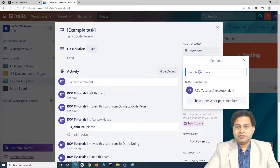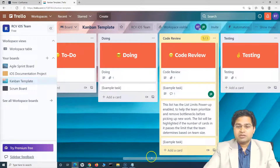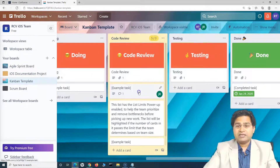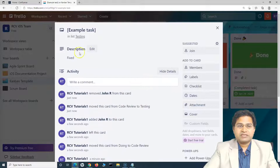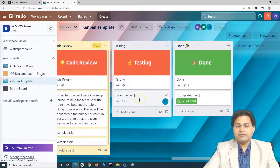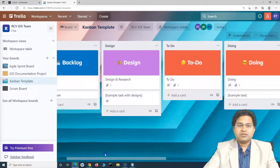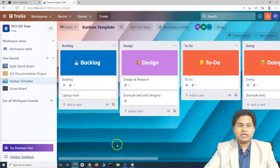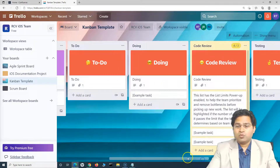John gets notified because he was mentioned in the comment and the card was assigned to him. John reviews the code; if everything is fine, the card moves to 'Testing'. After deployment, the card is assigned to the tester — say Rama — and once testing is complete and everything looks good, the card is moved to 'Done'. This is the complete flow of work in the Kanban board, a well-designed out-of-the-box template from the Trello team.